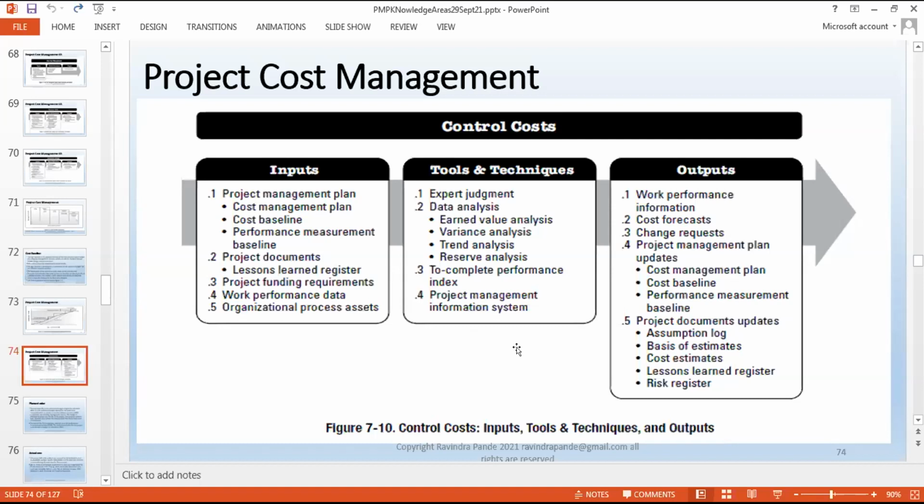Again, they specifically mention the change request, because that's the normal pipeline which comes in when we say we work in an agile, flexible environment. We keep adding to the solution, project, or product features, and we normally cope up with this on almost a daily basis. So if there are too many change requests adding up to my cost, I might increase my cost reserve, or I might guide my product owner saying, hey, product owner, I believe we have added 6 tasks in the last week, and they've converted to so much schedule and an additional resource.